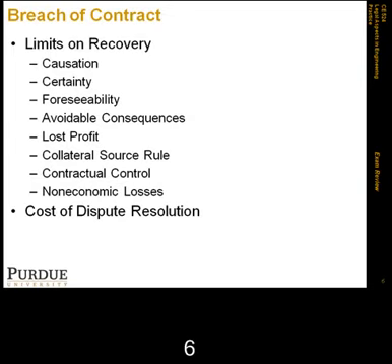Some states allow for something called reciprocal attorney fees, where whenever one party wins, the other party is going to have to pay the attorney fees for the winning side. But it has to be reciprocal, not one party paying for the other.